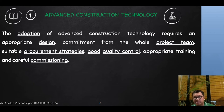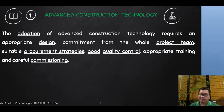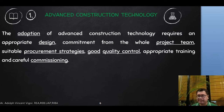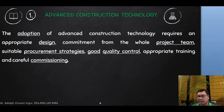The adoption of advanced construction technology requires an appropriate design commitment from the project team, suitable procurement strategies, good quality control, appropriate training, and careful commissioning. When you design something, you have to take into account what construction technology you are going to use. If the project team is not committed to a particular technology, you will encounter resistance that hampers progress. Some materials may be available at one site but not another, which is why suitable procurement strategies are necessary.